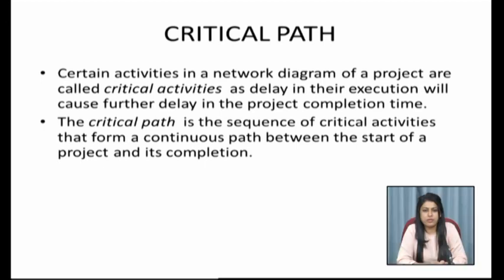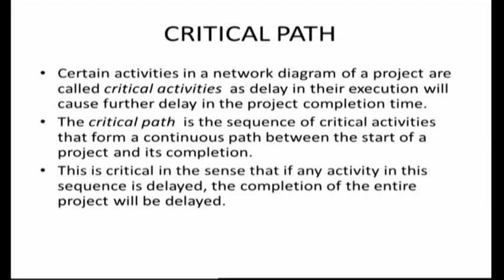We have several paths to reach the end of the network starting from the start of the network. But the path which takes the maximum time is called the critical path. This is critical in the sense that if any activity in this sequence is delayed, the completion of the entire project will be delayed.